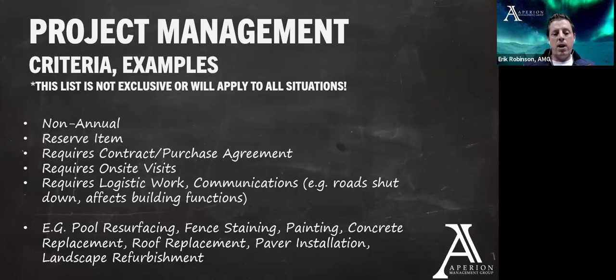These projects require a lot of logistical work. So a lot of communications. Let's say roads are being shut down, building functions are being affected. I managed a project recently that had a whole lot of coordination that was necessary with the rental company who managed a large percentage of units in this community. And we had to identify when we would be able to get into these units and do this work out on the decks.